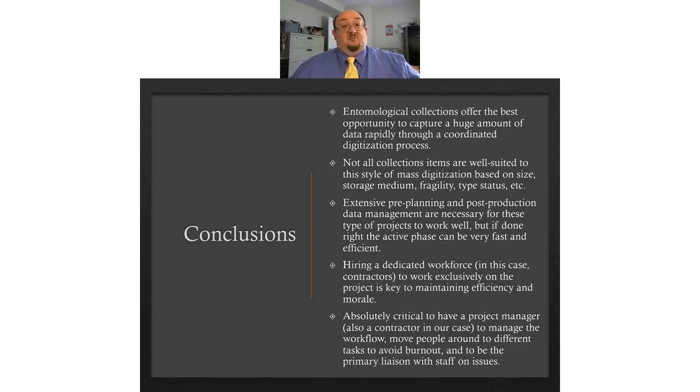I've already talked about the importance of pre-planning and planning for post-production data management. Those are super important. But if you do both of those right, then the active phase is really short. Again, hire a dedicated workforce. Don't just cobble it together from whoever happens to be around, because we have found through our two example studies that is counterproductive. So if you can, hire a short-term dedicated workforce, because you'll hit those benchmarks and people will overall be really happy with the work as well as the product on the back end.